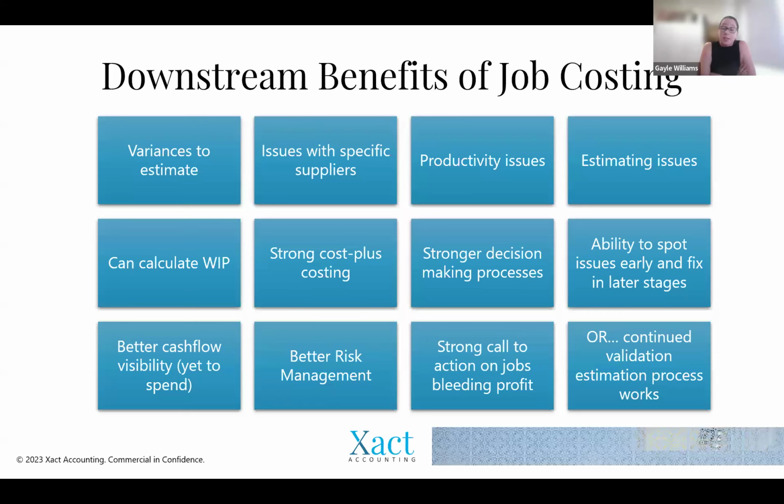If you're doing cost plus contracts, it's really important that you're actually doing your job costing properly, because otherwise you might be missing out on things. This question from Matt: WIP is work in progress, Matt. So it's as you're tracking on a job, how are you going compared to the costs that you've incurred versus the revenue, or the invoices that you've sent off to your client, so you can track whether or not you're keeping that job under control. Apologies for using an acronym there and not explaining it properly. Thank you for pulling me up on it.